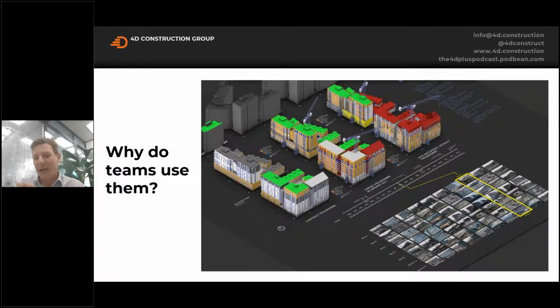So when I was in claims consultancy, we'd spend a long time going through emails, but before you know it, you've had a quick chat with the project manager or a foreman and said, why couldn't you get access on this day? And they'll turn around and be like, oh, I was receiving WhatsApps from, I don't know, the concrete truck driver or whatever, or there was a traffic accident. And that's access to information that you wouldn't normally have visibility to. And it can help unlock those discussions and, as I've mentioned, really strengthen your position.